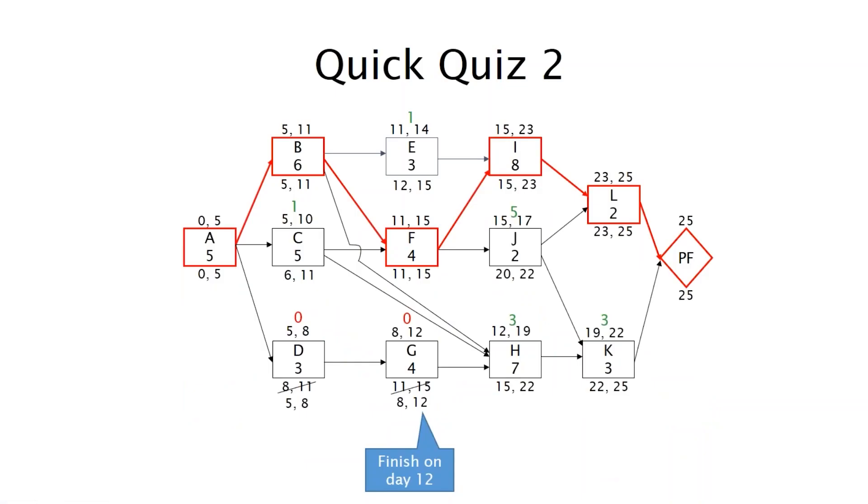One more quick quiz here. We have a path A, B, F, I, L, and finish milestone. And what we're applying here is a constraint that says finish this activity on day 12. And as you can see, yeah, I think my animations are a little mucked up on this one. But by applying a finish on constraint, strictly finish on day 12, that makes the start dates, the early dates match the late dates, and it makes them 12 as well. So then this now becomes a path with zero total float.